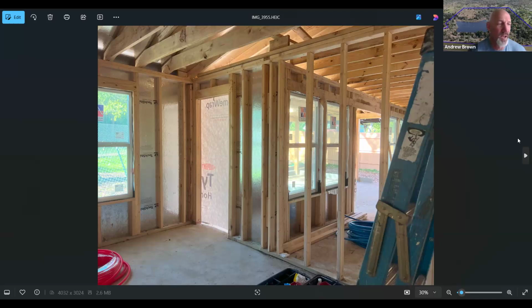So in this case, my memory is that part of it was simply making the closet 2 inches bigger. There's little things you can do that once it's done, people will be like, oh, I have a bigger closet or a slightly smaller closet, but they didn't know the original size. So it didn't matter. And by making that adjustment, it allowed Linda to go out and pre-order the glass and the panels and the door for the shower, so no one had to wait on it. And then they just built the walls where they needed to be to fit that. That was a great idea, sweetie.